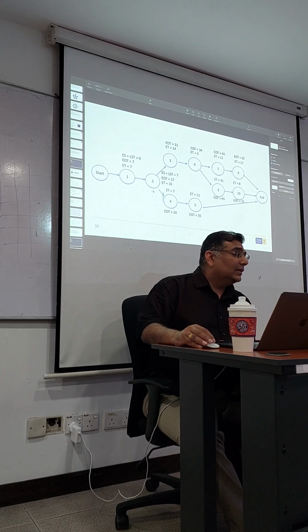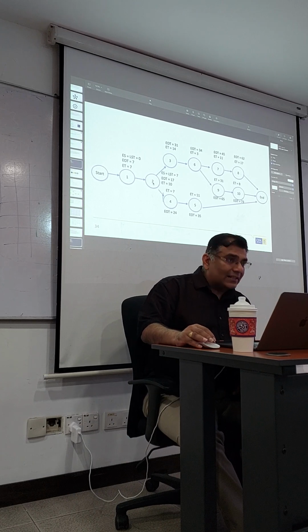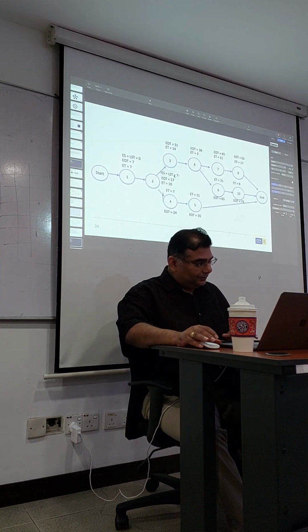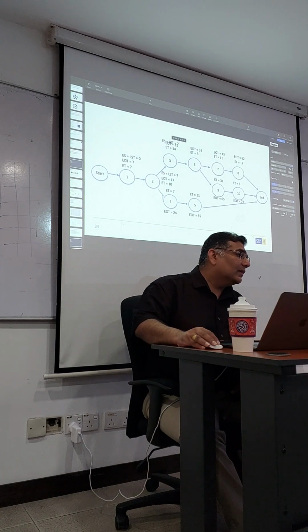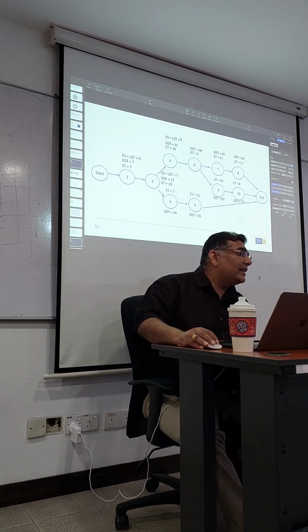I mean for the number 2. Next one, earlier start time is after this one finishes. Oh, we look at the ET. After this one finishes, you can start this. Earlier start time, later start time also 7. This one, earlier start time? 7. 17, right?